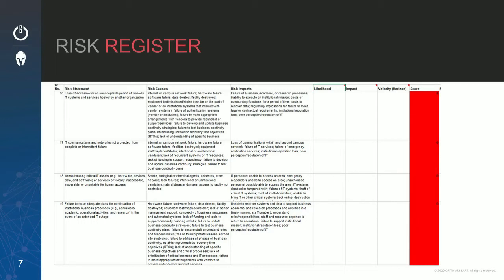So this is a very easy document to put together. It shouldn't take incredibly long. It can be incredibly long depending on how many risks you have identified for your organization, but it can be very simple for just certain domains within IT. You can make a risk catalog based off of application development, or off of infrastructure management. You can make it pretty particular to your specific area so you can at least identify what risks exist, the likelihood of that risk occurring, and the impact of that. That way you can effectively communicate throughout your organization.